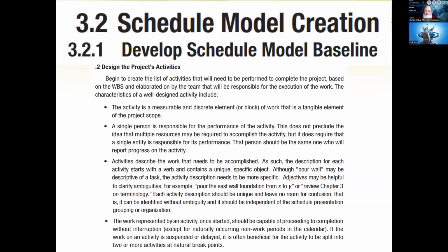So the same activity must be broken down and given separate identity of activity number. For example, if the main activity was activity number 1, first part will become 1A, other will become 1B.